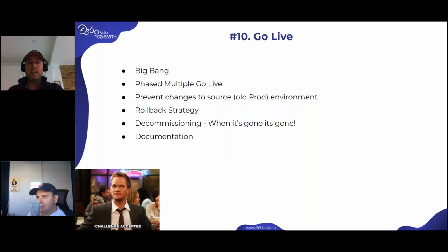And this is valid for the in-place. Some people have replied to say, we like the in-place. Okay, be careful. Read the pros and cons, I suggest that. But if you spend an entire day or day and a half to upgrade in place, to test everything, and it doesn't work, now you can always say, okay, but that's fine. I have my VM backups and all this. I can always roll back. Yeah, but that's assuming you've done that on the weekend, out of office hours. What about your instances? Again, rolling back is a point which is often neglected and very important.